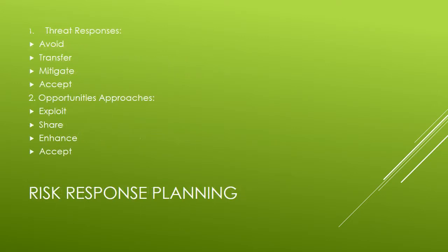Risk response planning. Under threat responses, avoid eliminates the threat entirely. Transfer approaches include insurance, warranties, bonding, and cost plus contracting. Mitigate either reduces the likelihood or impact, and accept means the risk is accepted.